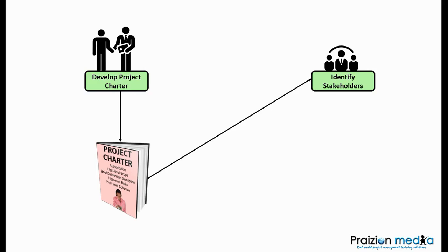Well, stakeholders know each other, and we could identify 3 stakeholders who could help you identify 3 more each. And you end up having 9, and it's just a geometric progression. If you really do it well, you can find people who are truly, truly important stakeholders to consider on your project.